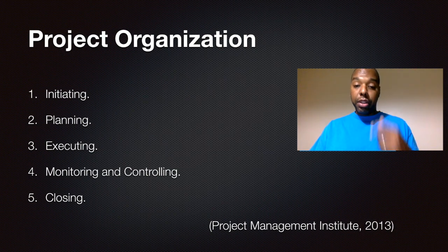And then in the 5th stage, there's the closing stage, which is where the project has to be completed, all contracts have to be closed, and a risk register needs to be generated and finalized. In fact, the risk register is something that should be generated throughout the life of the project from beginning to end, but it's finalized, documented, closed, chronicled and stored. And then the project has to be verified that the objectives set at the beginning, during the planning stage, have actually come to being.